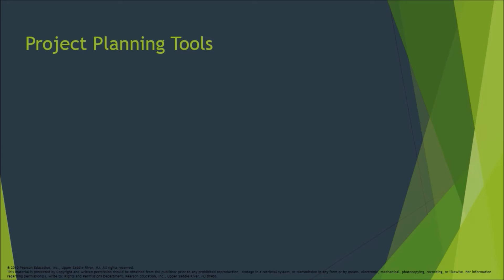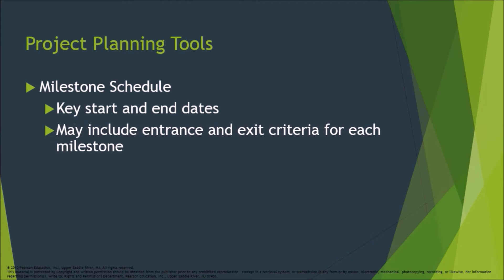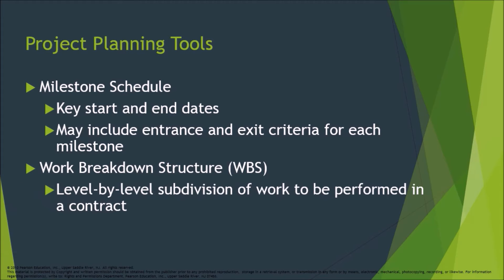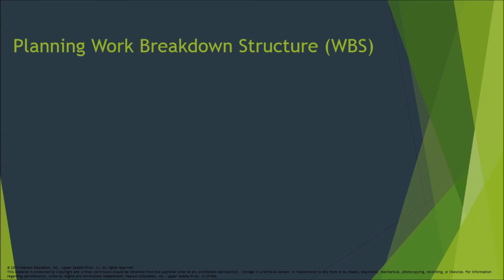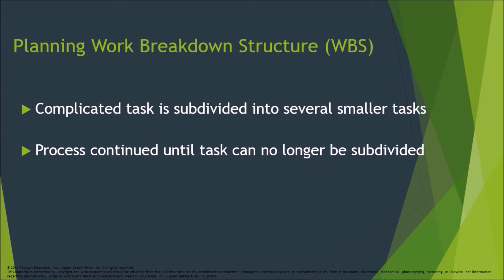Project planning tools include the Milestone Schedule — key start and end dates, which may include entrance and exit criteria for each milestone. Work Breakdown Structure (WBS) is a level-by-level subdivision of work to be performed in a contract, providing a common framework or outline. In planning WBS, a complicated task is subdivided into several smaller tasks, and this process continues until the task can no longer be subdivided.